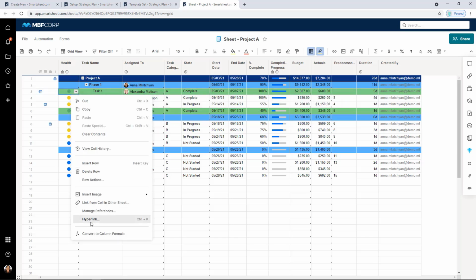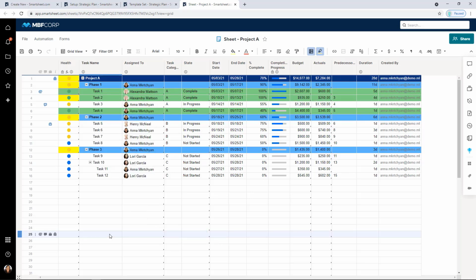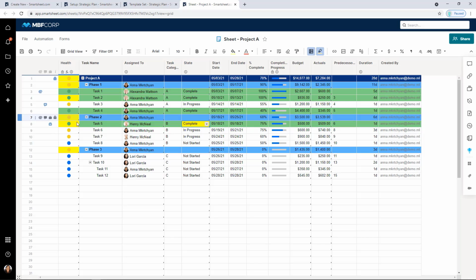This automatically applies this formula to every cell in the row, and the really great thing with column formulas is that they are not editable, which means I've created a formula, I have defined how this symbol column is going to work, and no one can come in here and override that by manually updating a symbol, not being aware there's a formula defining what the color should be.